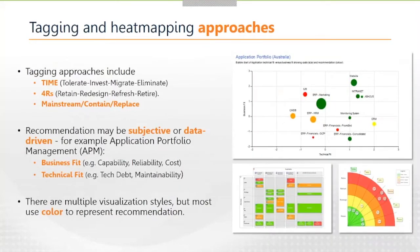When it comes to determining those heat maps, there are a few standard tagging approaches. Some common ones are the TIME ratings — Tolerate, Invest, Migrate, Eliminate; the Four Rs — Retain, Redesign, Refresh, Retire; or Mainstream, Contain, Replace. These are different ways of describing what the intent is for each of those applications, processes, or technologies. How you come up with those tags can be either subjective — simply getting business experts or technical experts in a room to give a rating — or you may take a more data-driven approach.